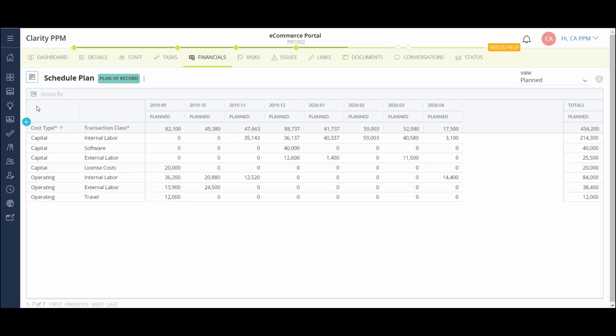A common challenge I see with several customers is reconciling project data with the financial team. Oftentimes, the project costs are broken down based on the limited categories of the PPM solution. Then the finance team has to dig in and translate the costs into their own terms. Here, we're able to configure the solution in a way that matches the project cost nomenclature with the finance team's, helping to reduce effort during closing periods.